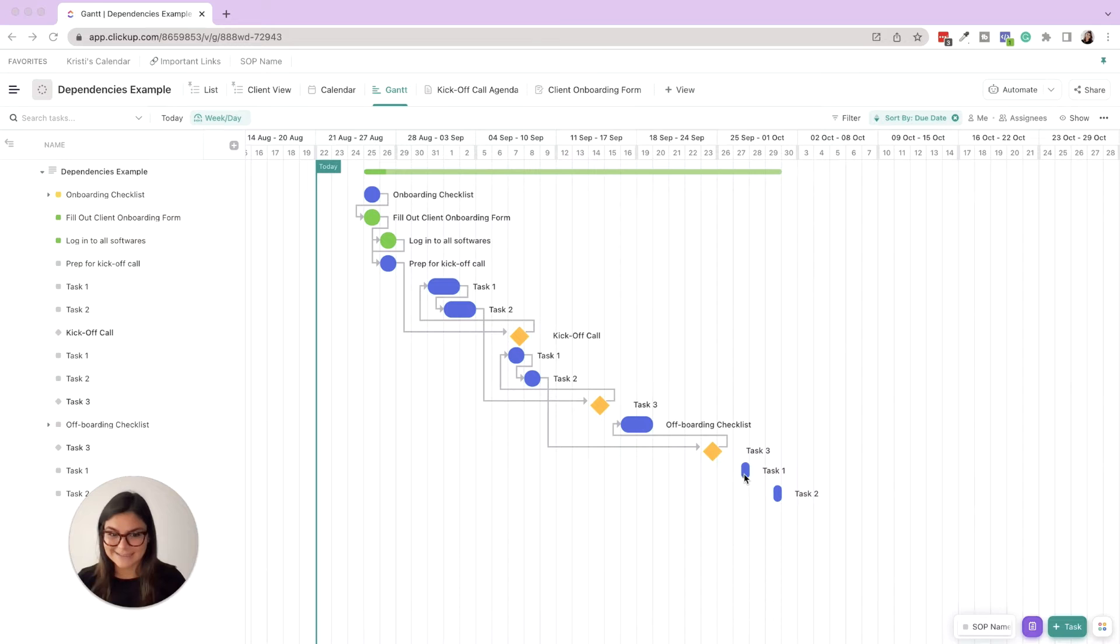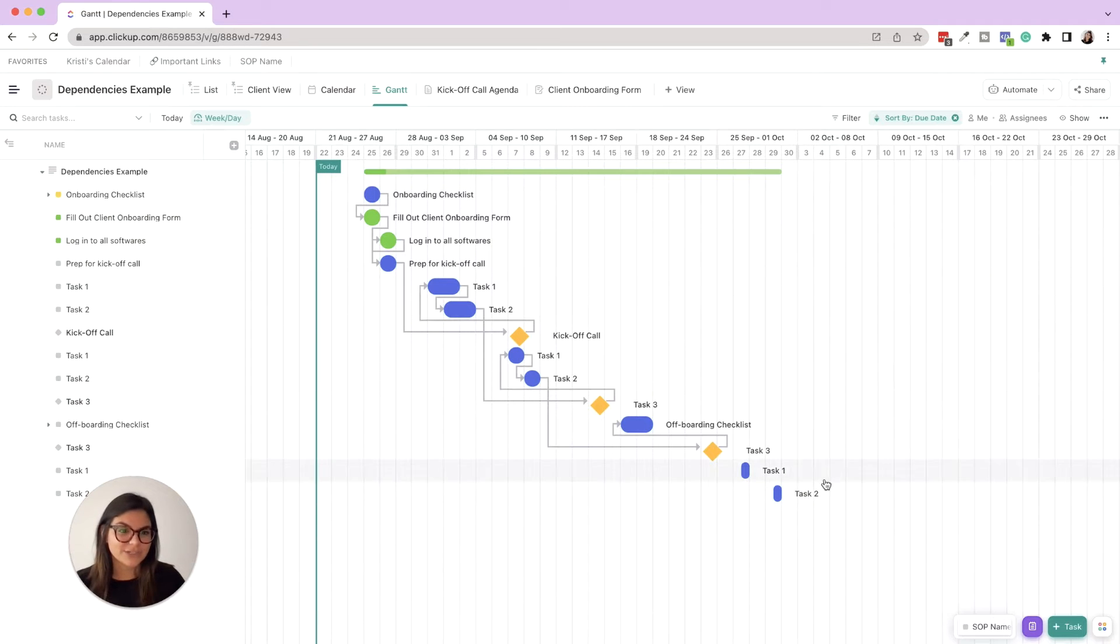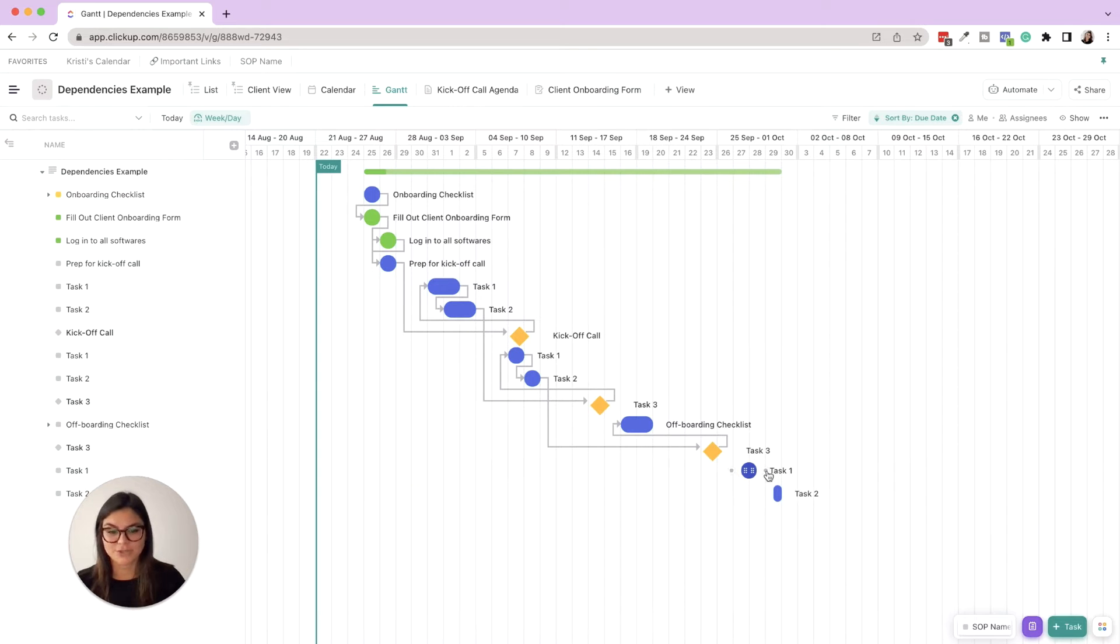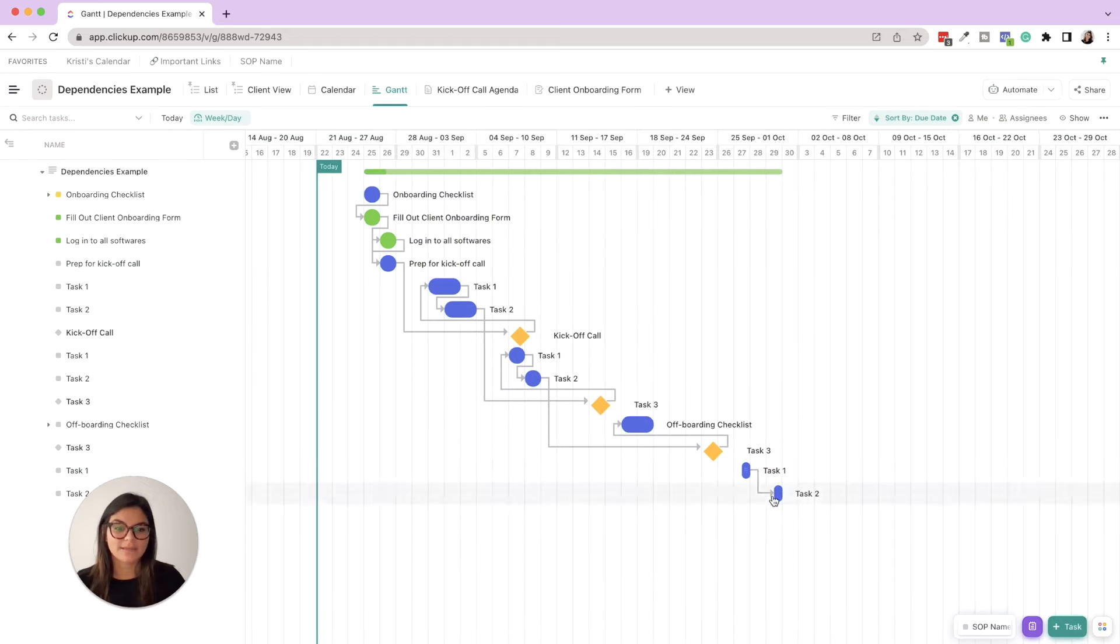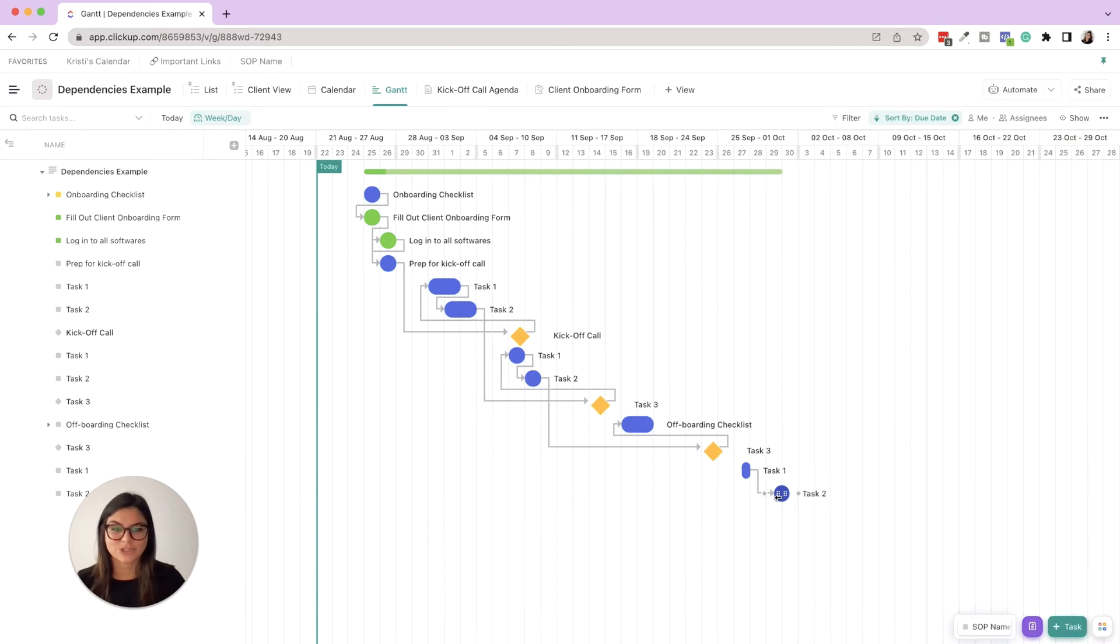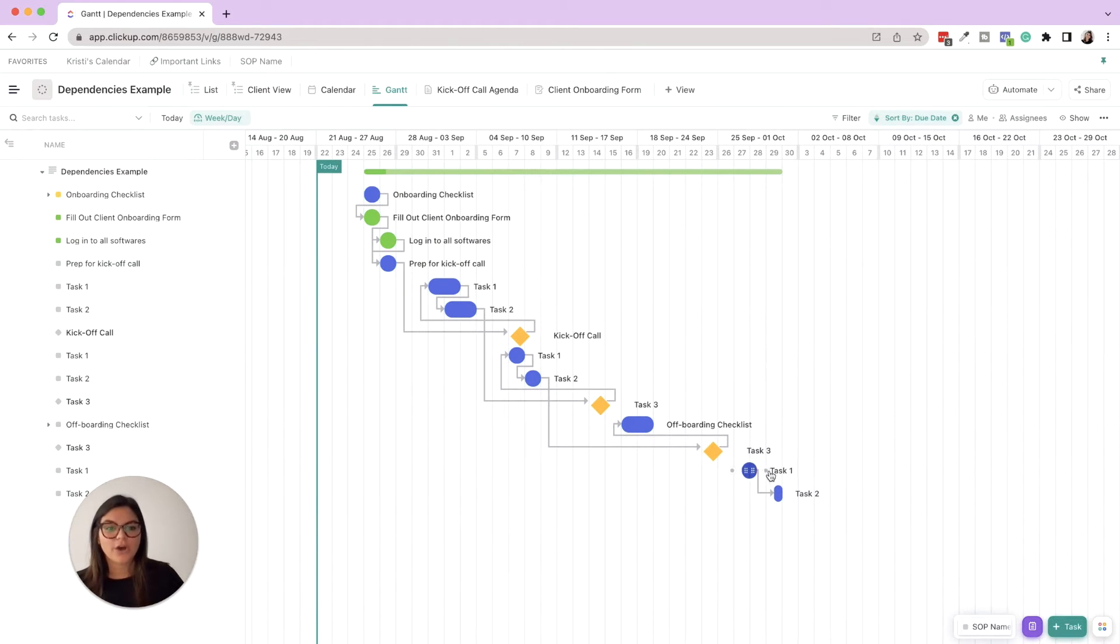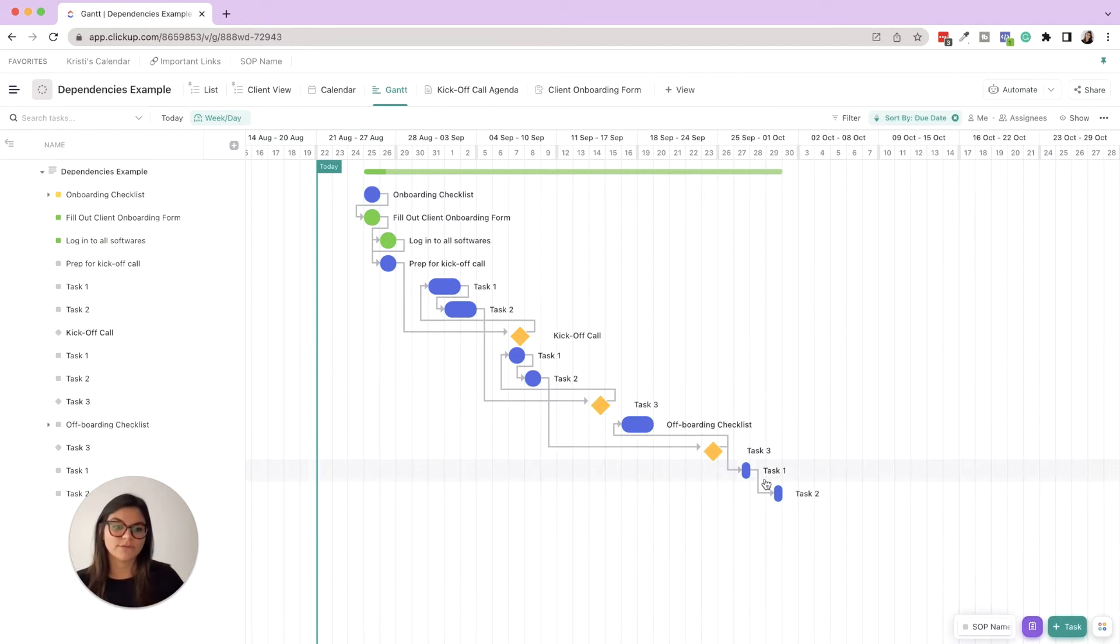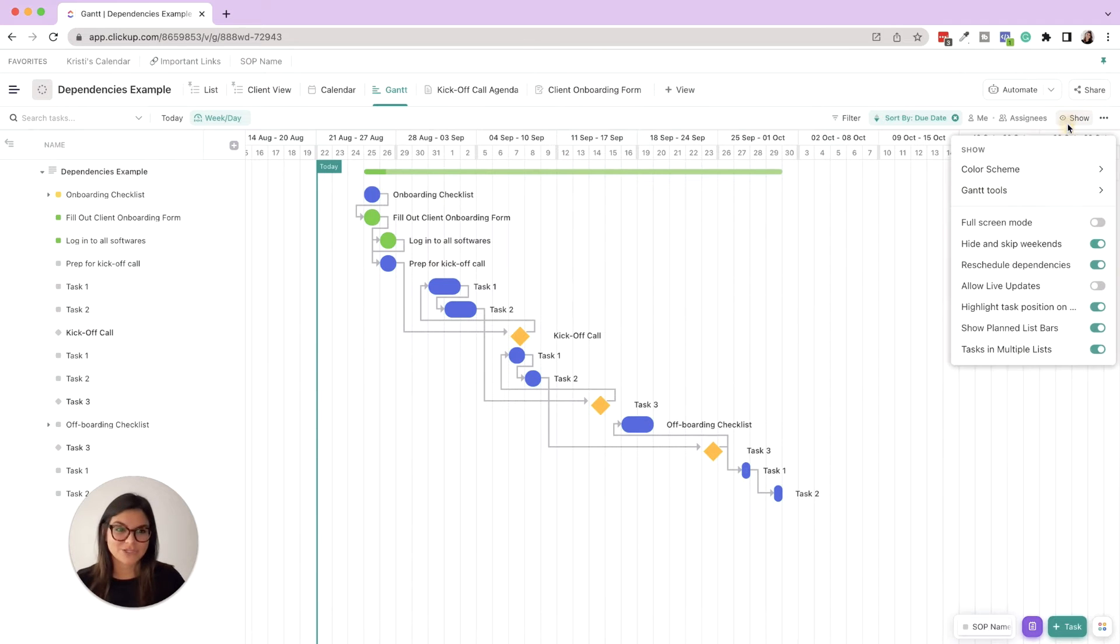So in here, all you have to do is click on this little bubble on the outside - and you can do before the bubble too - then you would just mark this, pull it from one task to the other. So then you can see, okay I'm mapping these things. I could also say okay this is gonna move forward, task one, right? And then this is what I wanted to show you - if you have on show reschedule dependencies, that means when you move one task forward, it's gonna move the due date of the other task as well.